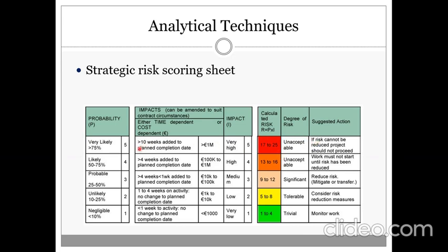Always remember that these are examples for the handling of the qualitative risks that we got. Even if we have many numbers on the screen, we are still in the qualitative assessment of the risk. Why do you consider this as qualitative? Because this is an approximation for the risks. Our target is to find a categorization for the risks that we have, like very high risk, medium risk, low risk, and very low risk, and so on. So this is actually our target from this phase or this process of qualitative assessment or qualitative analysis.